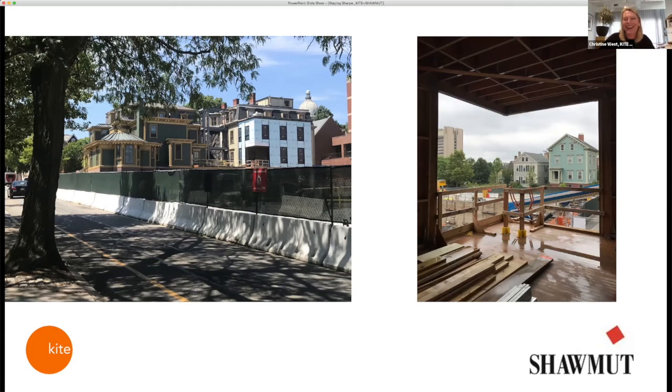Because the PAC schedule was a much bigger deal, and a daily delay on a project of the scale of the Performing Arts Center starts to swamp the budget of Sharpe House. So if they needed us to rush a little bit, to put some extra people on it, we did what we needed to do. So we got the foundation package out as an early package. We had to work through the overall design and have a general direction.